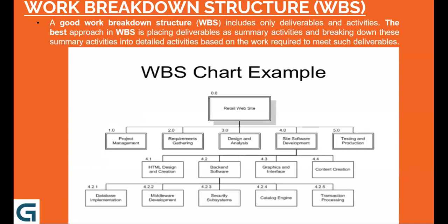Now another example is, while we need to charge the customer, this is how we can even utilize it. Say BA would require some specific document for making a diagram. BA would require specific software. So now that software will be charged to which WBS? As for BA? 2.0, perfect. Now if I have to say we need some additional software for database security, database and that too security, which WBS will be charged for that? 4.23.